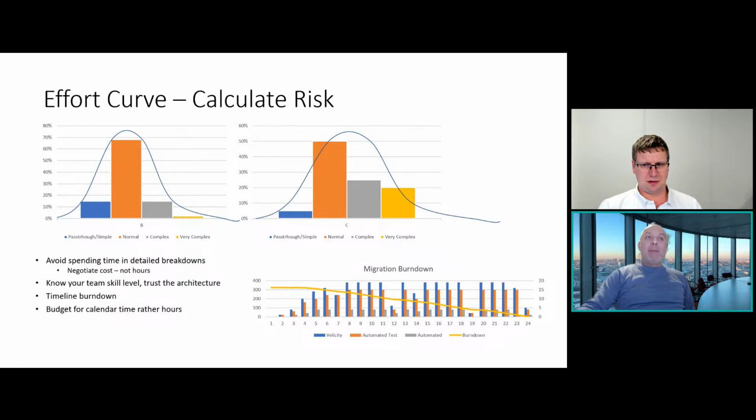But regardless whether it's a very stable customer or might be a customer with more complexity, the complexity curve shifts a little bit wider to the right. And what that helps me is to actually try to look into what I said, the risk, right? What is the kind of contingency that I will have? I want everybody to notice that until now I have not talked about automation or optimization. I generally start with estimation in a plane as if we would have done it manually itself, right? Just to put a context on how it will be done.